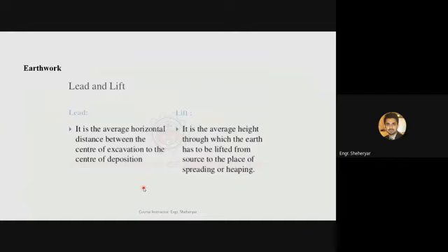If you're a contractor doing excavation in the field for construction of a road, and you have quoted a rate of excavation, and you are asked to excavate the road material and dump it like 1 kilometer away from the excavation point, it would definitely increase the cost of the excavation, because you are picking up the material, going 1 kilometer away from the site, depositing that material there and coming back towards the excavation point.